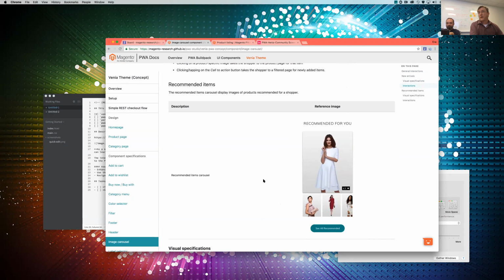Since we haven't estimated this, from a product standpoint I think it'd be great to have all of them. What I see here is an iteration from one to another. I think we all agree cover flow is ultimately the end state, but it's going to take some finessing. That alone is going to take a full sprint of work at least to get those interactions down perfectly. But it feels like it builds off of one of these others, like the simple recommended. That might be a good way to start there first, and then we can scope out the cover flow with maybe some of the connectors done first and do that right afterwards.